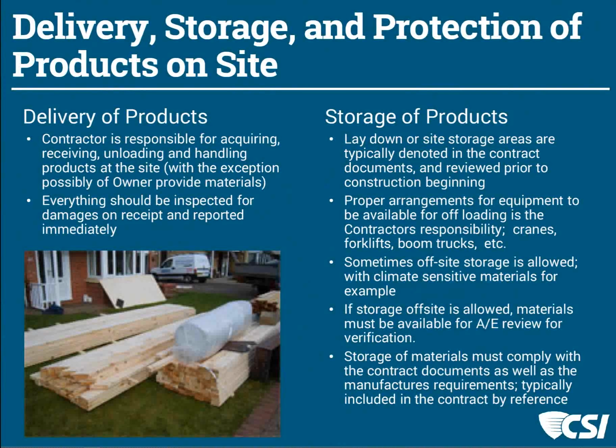Of course, they're responsible for inspecting to see if the materials that have been received are in good condition. We, of course, go out to make job site observations. One of our critical involvements with materials on the site is processing pay applications for those stored materials, and we'll talk about that here.